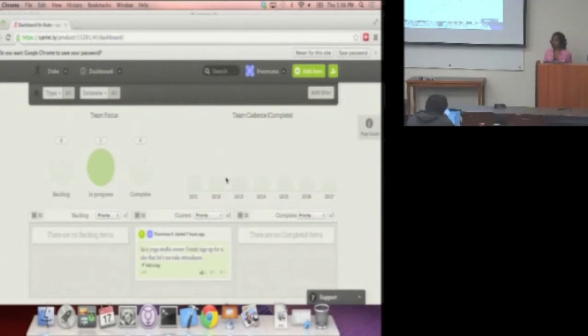In that case, we're going to want to create some estimates for how difficult we think it is. So this will factor in not only the story itself, but the complexity of the story. The other thing it'll do is, let's say you said, oh, this story is a 5. Well, if you deliver it really quickly, then it's possible that it actually wasn't a 5 and you misestimated, and it will tell you.